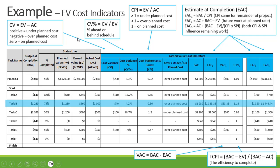At the project level: cost variance = $2,400 − $2,600 = −$200. Cost variance percentage = −$200 ÷ $2,400 = −8.3%, so the project is 8.3% over planned cost. Estimate at completion is $5,200, variance at completion shows an over-expenditure of $400, and the to-complete performance index is 1.09 — meaning it's slightly harder to complete the project.